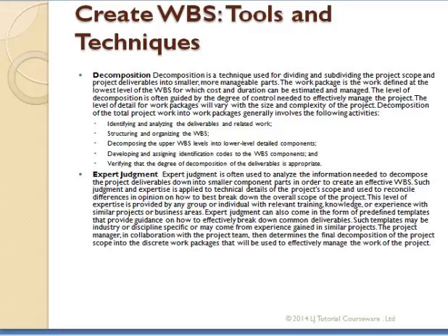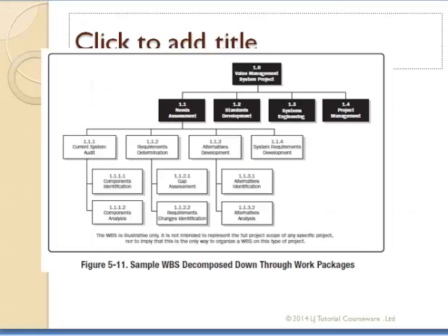One can be pegging the ground. After that you do excavation. After that you do blinding. You blind with cement, then later you can lay your foundation. You have actually decomposed digging into smaller tasks. Then also you can use expert judgment. Now see a sample WBS.